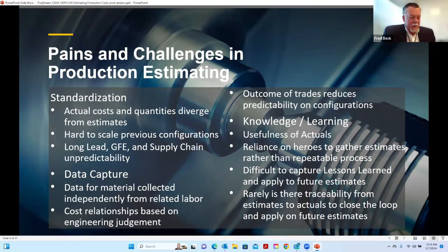The quick response, it can, but process usually doesn't take into account all the different possible variable avenues and degrees of freedom associated with estimation. If you can have that intentional process of trying to capture and apply lessons learned and refine and go forward and improve, as well as have a heavy reliance on real data, actuals recorded during previous execution efforts, and then be able to refine your estimation tools and approaches, then process can be a definite improvement.